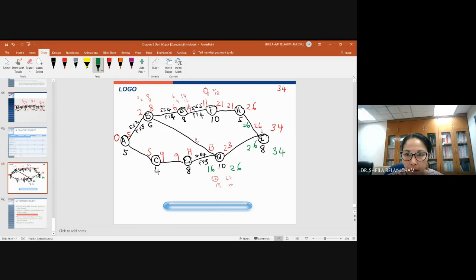So 21. Moving backwards, 21 you start, you will finish 21. Minus 10 days, 11. Coming backwards here, you will calculate both and choose the smaller one. I'll put the number here. Coming backwards, start to start 4. If G starts at 13, E will start 4 days before 13. So 13 minus 4, you should get 9.